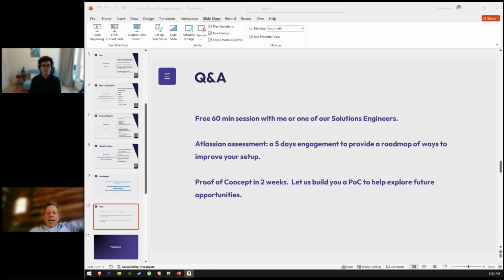And finally, I'm actually going to take Michelle's last question because this is one of my favorite scenarios that so rarely happens, Michelle, but when it does, it's a nice treat. The question is, if you committed to story points but actually completed more than committed, what happens? Do you pull in additional user stories? The answer to that is yes. If you've actually completed more than committed, you can always add additional work to the sprint, and then continue adding it that way.